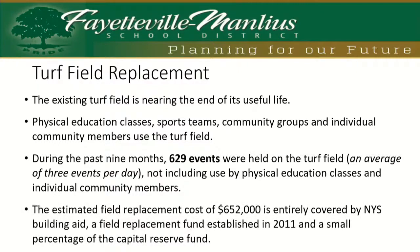Now, contrary to what's out on social media, the estimated field replacement is about $652,000. And believe it or not, this will be covered by building aid, which will cover about 80% of that because we are doing work in the high school. If we were not doing work in the high school itself, the adjacent stadium field would not be covered by the aid. But because we are doing the work in the high school, we anticipate about 80% of that $652,000 will be covered.